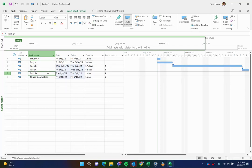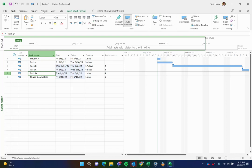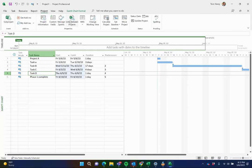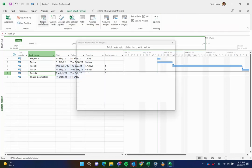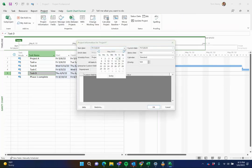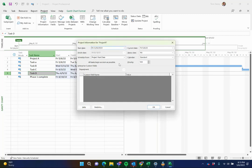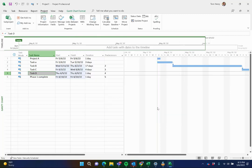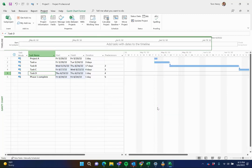And the thing that Microsoft Project does that Excel does not without a lot of work from a formula standpoint, it gives you dates. You can plan things out, how long do you think things are going to be? You can change the project start date. If so, things happen outside of the control of the project. Let's say we were planning on getting started on the 6th, but now it's going to be the 20th. Boom, everything's updated.